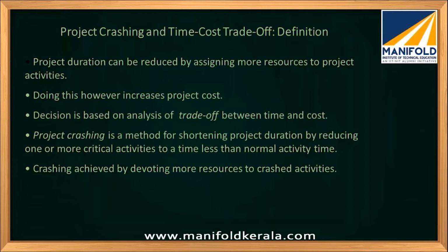Crashing is a method to shorten the project duration by reducing one or more critical activities to less than the normal time. It means the total project has to be completed in less than the normal time. So crashing is achieved by devoting more resources to the activities which are going to be crashed. So this is the philosophy.